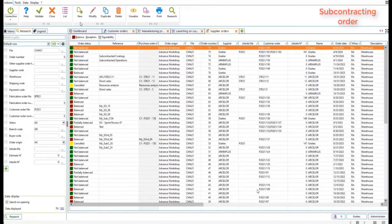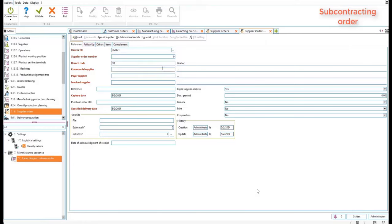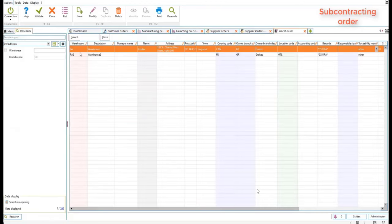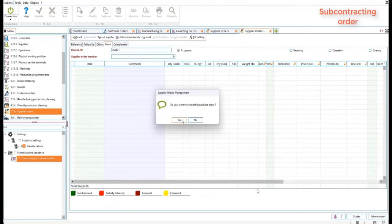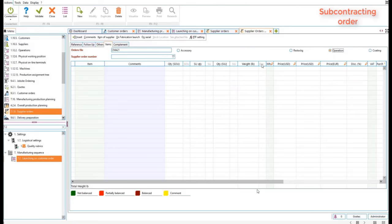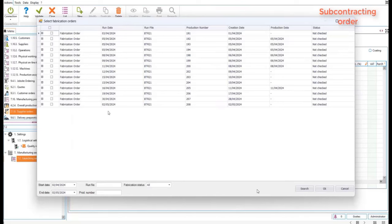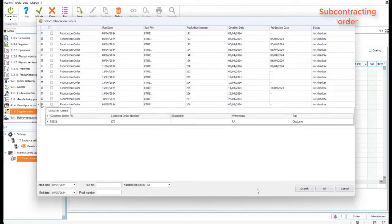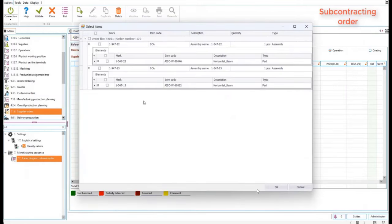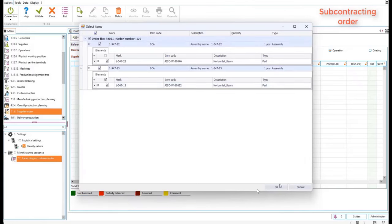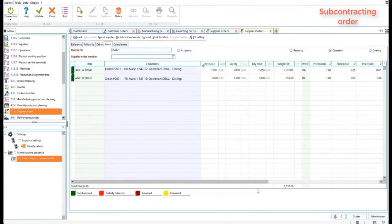From here we'll go to our supplier orders menu. I'll select the supplier and the warehouse, then save the supplier order before selecting operations. When clicking on 'Fabrication Orders,' it will show you the items that have operations to be subcontracted. You can also consolidate multiple items from other fabrication orders to be subcontracted at the same time — meaning if you have multiple projects with items in each fabrication order needing to be subcontracted, you could select the entire list and consolidate them all within one single supplier order.